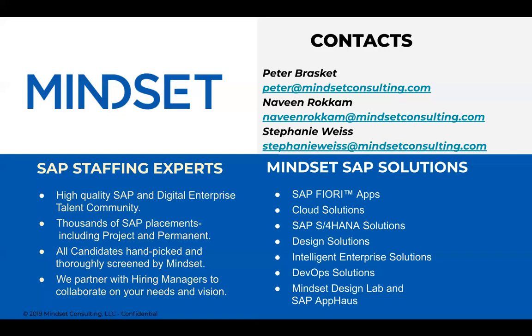Okay, thank you. So I've got one question here, I guess, Naveen, well, actually, let's do this with Stephanie. Stephanie, what's a big gotcha in your experience that either causes the EWM project to be delayed or delivered over budget? Good question. I think one of the key gotchas is not having the right business people involved from the get-go. I'm specifically referring to warehouse managers, warehouse super users, the people that really know the business processes in and out, the people that really understand the issues, the pain points, and the current workarounds that they're doing to circumvent the system because it doesn't function the way they actually do their business processes. So having those people involved during the design thinking sessions, at the very beginning, really helps the project and prevents reworking later on down the line.